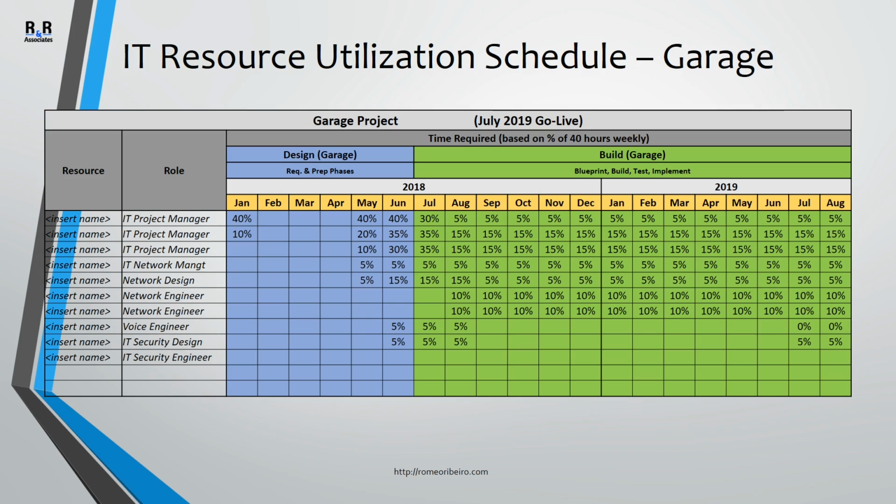So you will have project managers, network managers, network engineers, network architects. On the voice side, you will have security, etc. So the big takeaway here is timeline and the percentage of what you will need estimated from their time based on 40 hours a week.